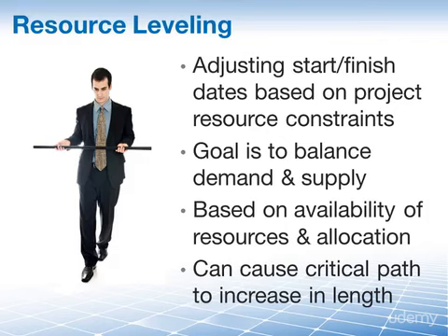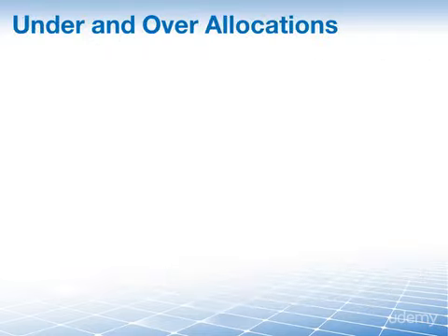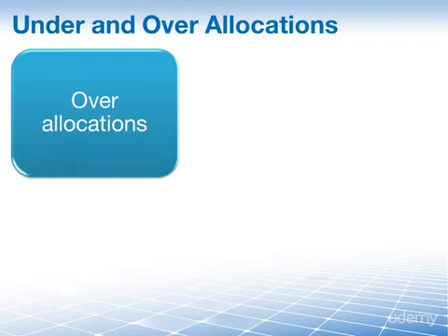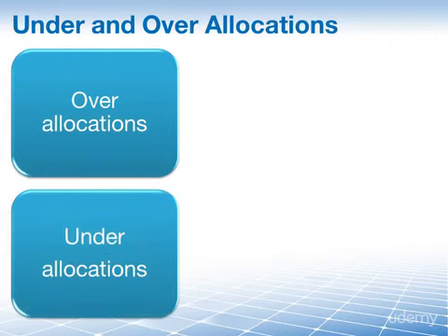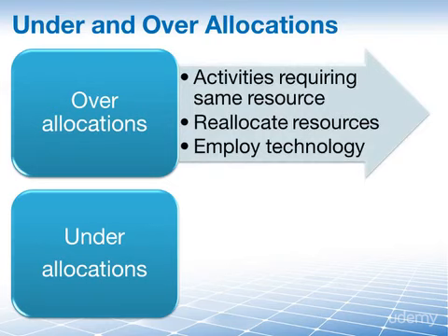The 2 main reasons why you may want to use resource leveling on your project is because you either have your resources over-allocated or you have them under-allocated. So as you perform your resource leveling, you will find over-allocation of resources. This might be because we scheduled certain activities that require the same resource simultaneously, and a single resource, of course, can only work on one activity at a time.